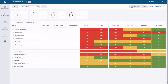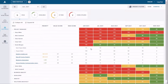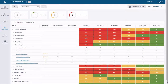Some project work probably needs to be taken off their plate. If I drill down to look at Derek's plan, we can see that he's assigned 10% for non-project work. This is necessary to capture the amount of non-project time, because virtually everybody has some percentage of time where they're in staff meetings, checking email, or doing day-to-day work. Then we can see a breakdown of all the project work, and some of these projects finish. This gives us a roll-up of both the team and the individual, the non-project work and the project work.